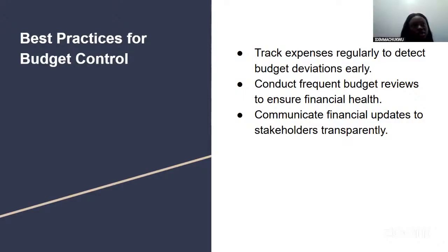Yes, it's very possible that it could cause a scope creep, because now you're wanting something bigger. It changes the already agreed upon scope. Your duty as a project manager is to go back and analyze whether this will increase the budget or cost us extra time.